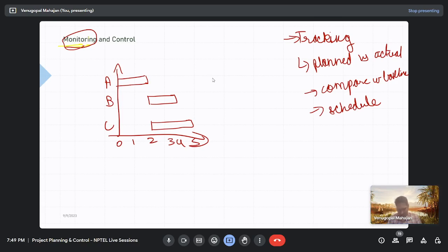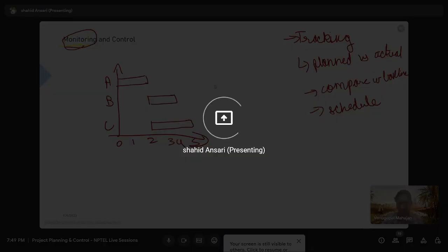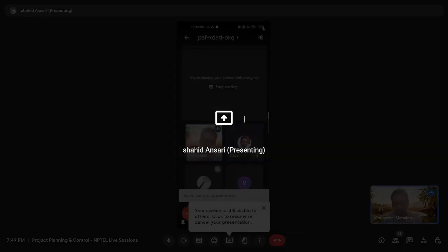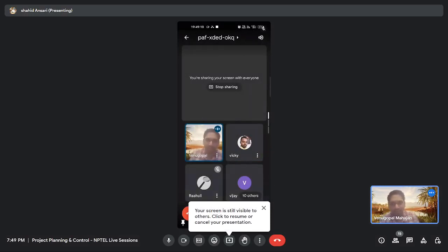By converting it into percentage, it won't be possible, sir. By converting into percentage, yeah, means 5 days is 100%. Okay, so let me draw it for you. This was 100%, sir, and by the end of day one, you should have done 50%, right? But you have done only 25%.